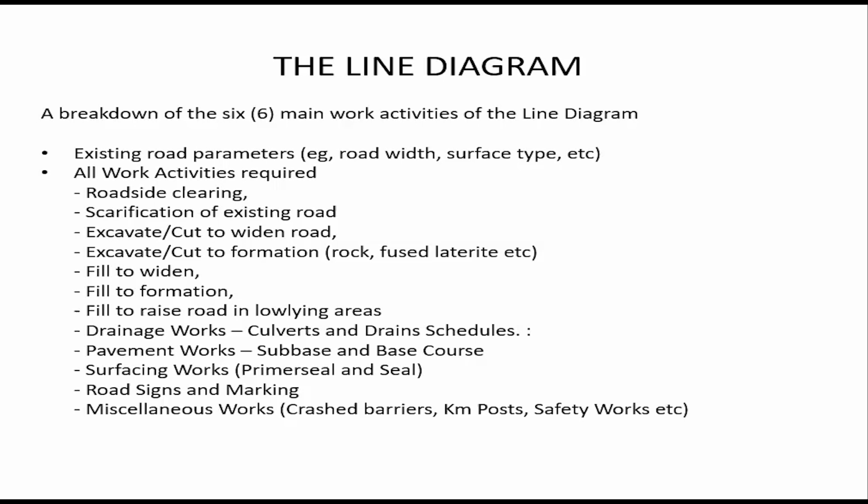Then we have the drainage works, where we have the covers and drains schedules. Then pavement works, sub-base and base course. Then surfacing works, primer seal and seal. And then road signs and markings. Then the miscellaneous, that I said earlier, crash barriers, kilometer posts, safety works, etcetera.